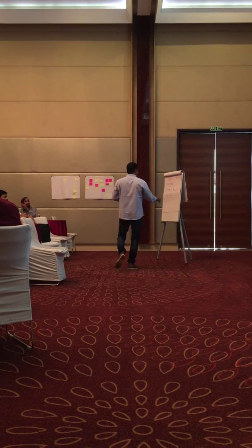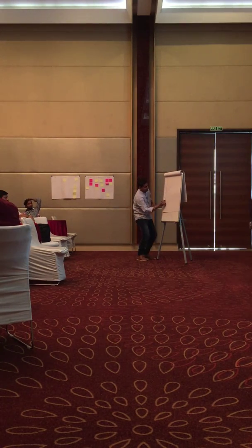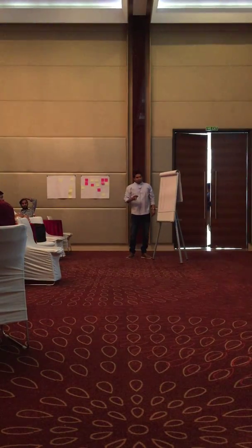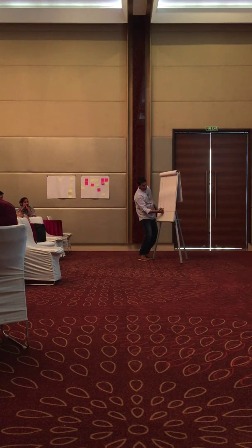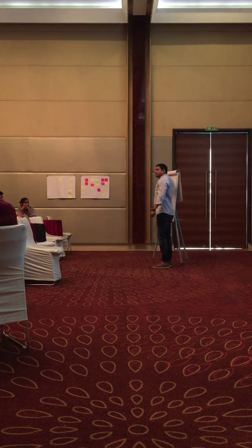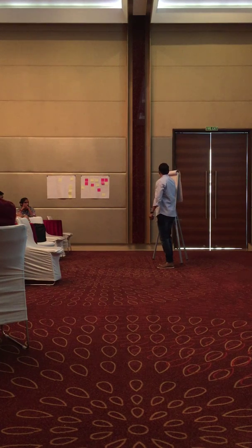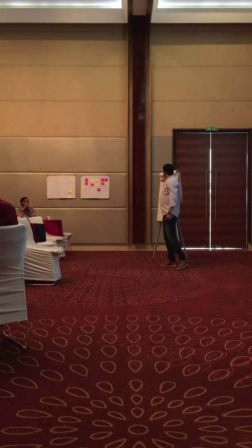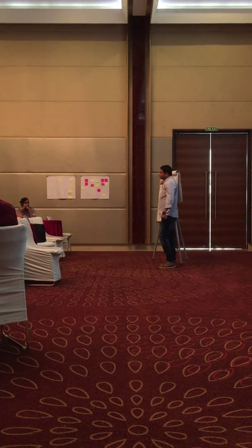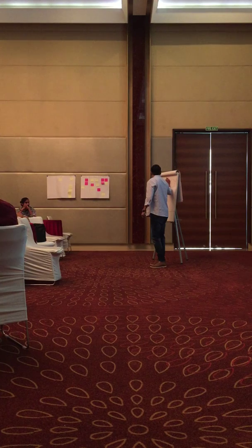Now, if you consider a product backlog that looks like this, like a stack, right? So this is your product backlog. Items here on the top and items here on the bottom will have specific characteristics. From here, you will pick items into your sprint: planning, review, retrospective. When you pick from the top, you obviously want them to be very detailed, small enough, with acceptance criteria, dated, all those things. So items here are more granular, small enough.